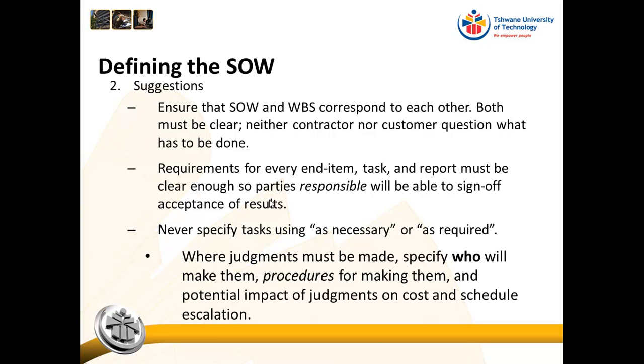So that is then a clear indication, and we can also then say that we will get a lighting engineer in to come and measure the number of lumens. And we can also say that at the moment we are budgeting for a lamppost every 100 meters, but if the lumens are not